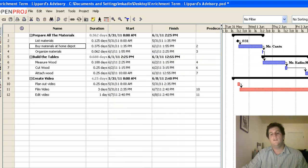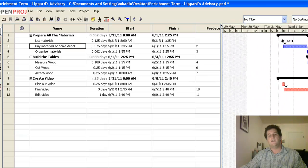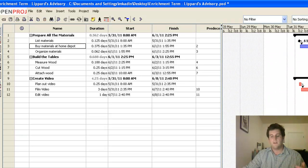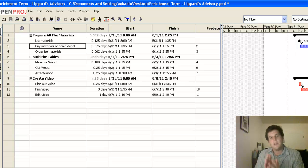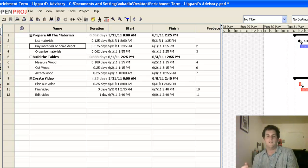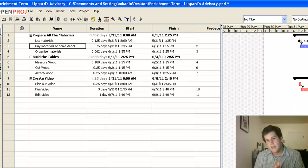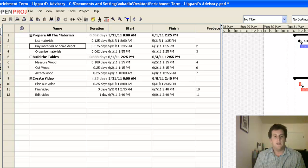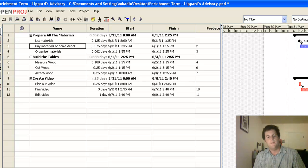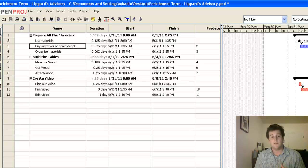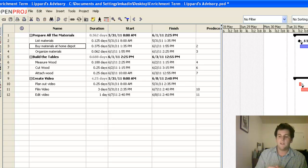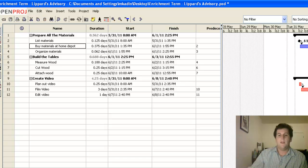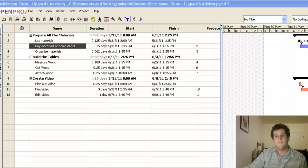And so when you're done, you should have a giant list of steps for your entire project. You should have who's going to be working on those steps. And you should see what can happen at the same time, what needs to be finished before the other stuff can get started. And with a giant plan like that, you're going to know exactly what you need to do when you sit down on day one of enrichment term. You won't be farting around. You'll be building. You'll be planning. You'll be ready to create a really awesome project. So go ahead, get started, finish this thing up. And next week we'll keep going and you can show it to your team when you get back.